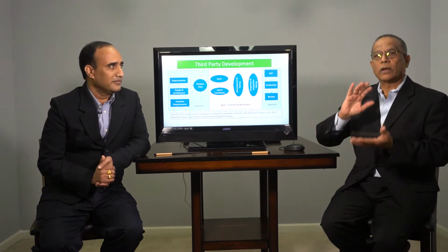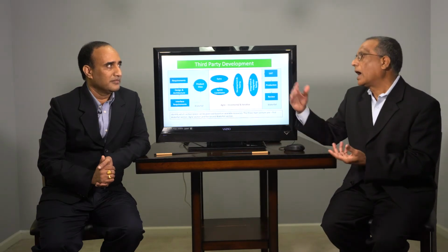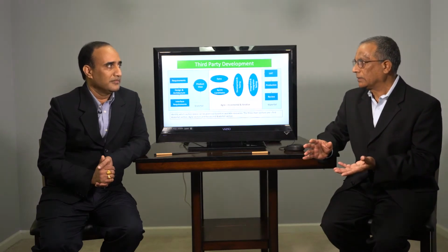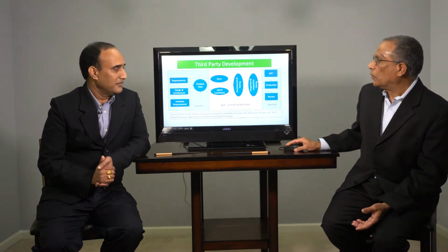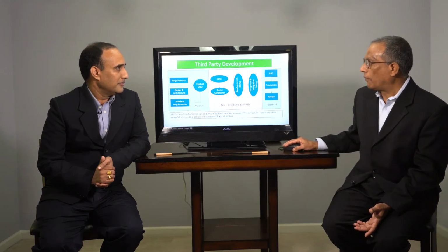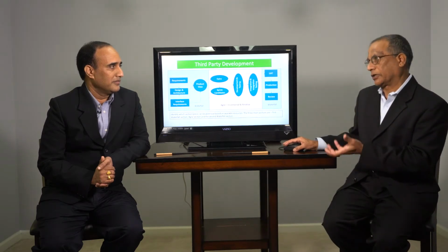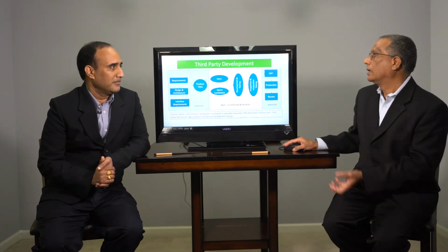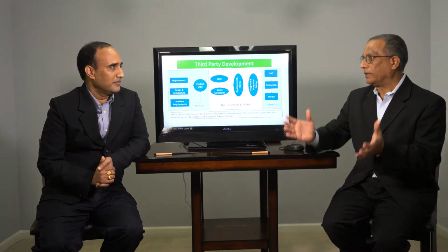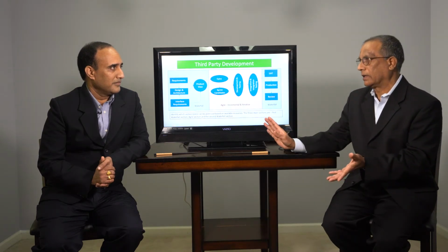If you are giving this to someone outside of your organization, like IBM or things like that, then it's a third-party organization, right? By looking at this model, there are 3 sections here. One section is the foundation work, basically the first waterfall. The second one is the construction and testing, right? The third one is the deployment. You can take any one of these and give it to the second party or third party. It's up to you, right?